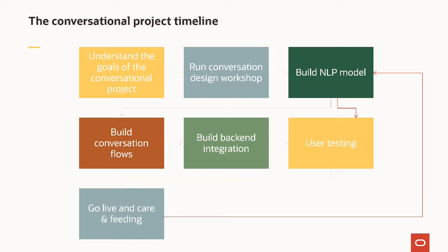And the benefit of having an architect or an implementation lead in these sessions meant that the output of these sessions would immediately feed the implementation. We had situations where there was a gap here, and the implementation team was not part of the workshop, and we saw a big difference for those implementations where they were part of the workshop, right? There's an easier transition. They were part of the whole process. They know exactly the use cases, and it makes for a much better, smoother implementation.